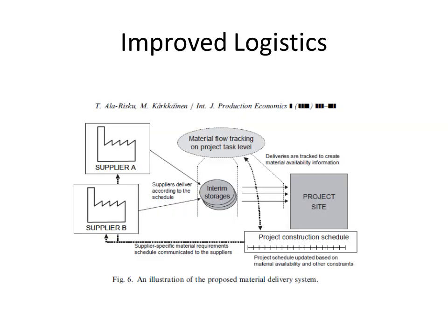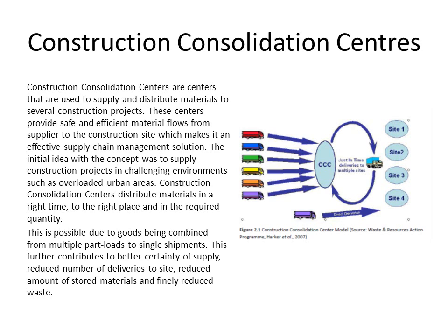And my proposed solution in the case study, which is cited in some of the construction textbooks, is that the suppliers really should be delivering to storage or regional distribution centres, and then the project manager on the site, the construction manager or the builders, pull in what they need that day, that week from the interim storage, rather than the big suppliers dropping stuff off at the site when it was originally ordered. It means the project site can plan deliveries better, reduce the amount of vehicles, etc. And that's pretty much the detail there.